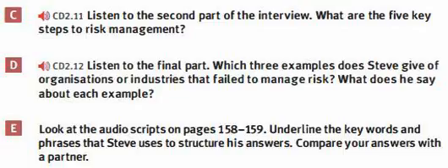Only at that stage does one then go on to assess and prioritise risks. Point 3. After identifying risk, the next stage is to assess and prioritise those risks. Now, a useful tool to recording prioritised risks is called a risk register. It's a way of an organisation recording those risks that are most critical to the organisation, and more importantly, what the organisation is doing about those risks, when they're planning to do it if they haven't started yet, and who owns the risk. Point 4, mitigating risk.